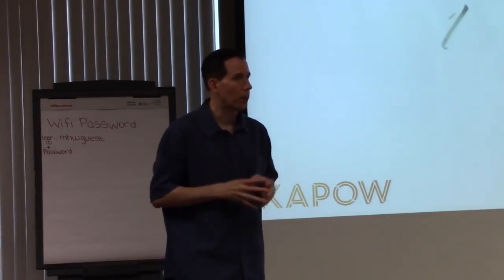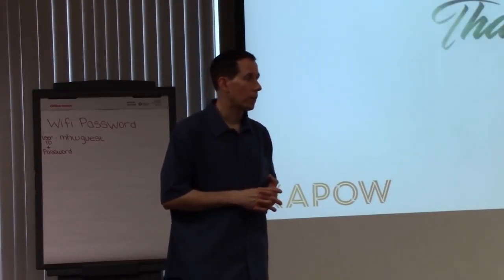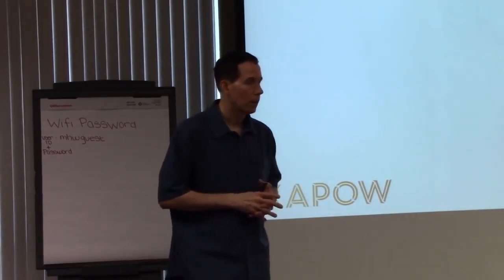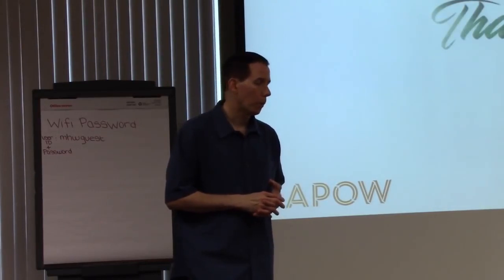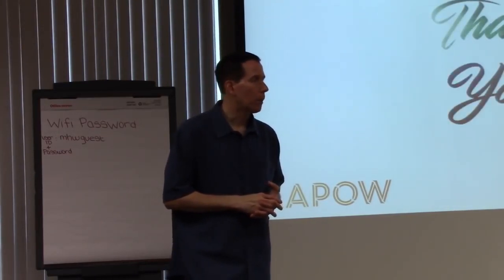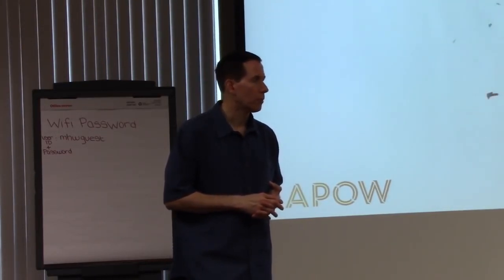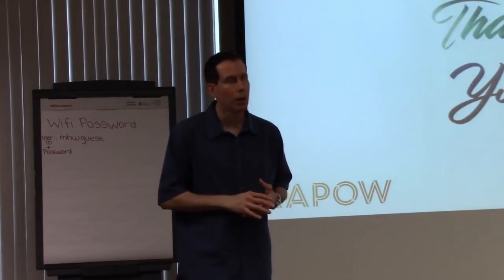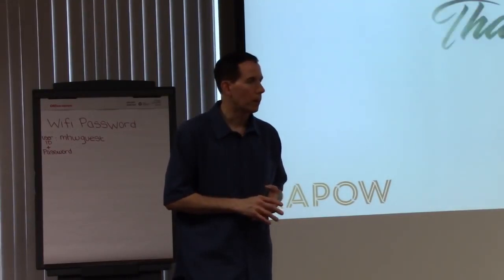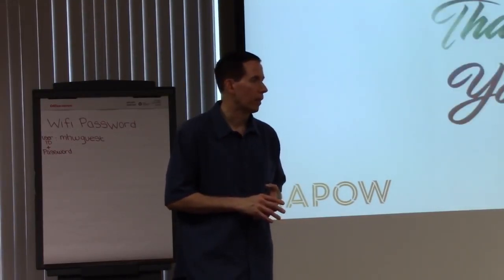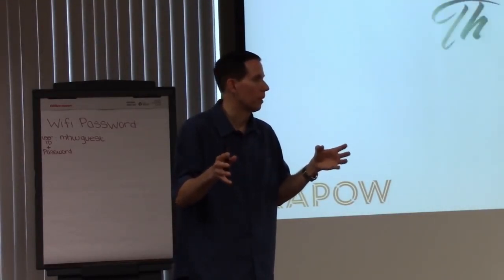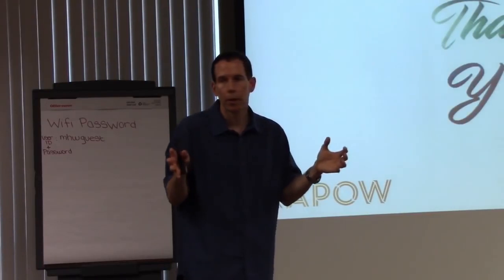I noticed in the 1 week sprint, there wasn't a lot of time to discuss and get our arms around it. And the chunks ended up being so small just for where we were at. I wanted people to also learn this too. So it gave some time to adapt to this, because this was something kind of quick. And given how many points we were rolling over each week, it became apparent to me we were trying to bite off too large a chunk. So we didn't know how to decompose stuff. And that's because we really didn't know how to design.